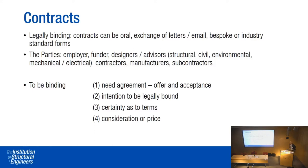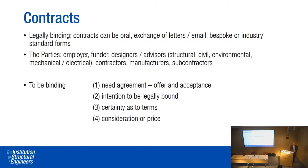Contracts are legally binding. A contract can be created orally, by a simple exchange of letters, by email, or through bespoke forms drafted by lawyers, or industry standard forms. The parties to a typical construction contract are wide — from the employer, funder, and investors right down to subcontractors and manufacturers. You essentially need four elements to create a legally binding contract: an agreement, offer and acceptance of that offer, a promise to do something, and an agreement to do that.